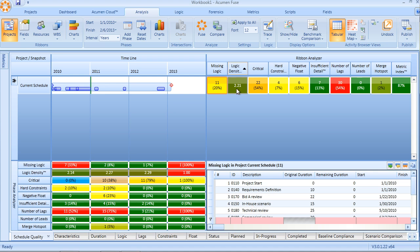Logic density is a metric that is used to reflect the quality of the logic in the schedule. In theory, with each activity needing at least one predecessor and one successor activity, the average logic density within the schedule should be at least two. Conversely, the more logic you have in a schedule, the more converging paths, the more converging activity nodes, the more converging logic links into activities, that logic density factor increases. As a rule of thumb, logic density really should stem anywhere from a value of 2 up to approximately a value of 5.